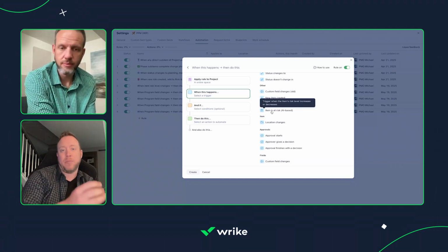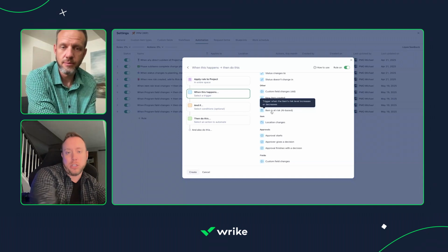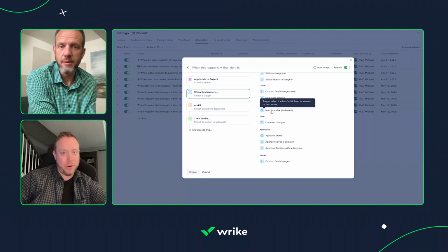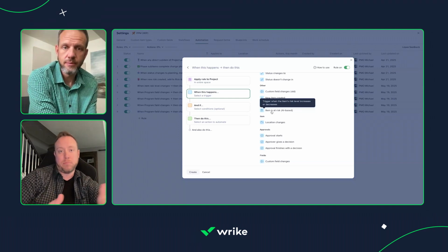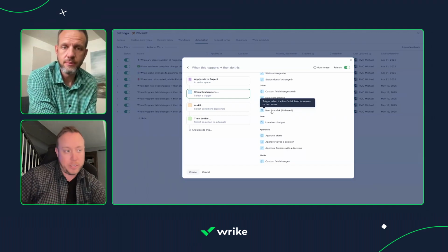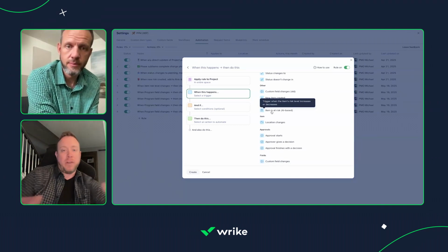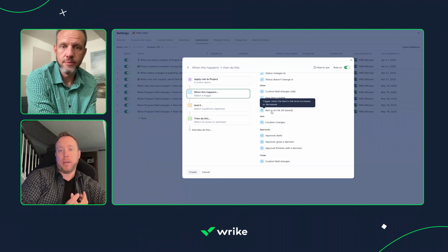We have the data. We can analyze what's at risk. Now we can use that data to launch automations as opposed to having to build our own at-risk automations. Wrike's gonna handle it for you. Once upon a time, I'd be like, well, when do you want to get an at risk? Two days as a due date's approaching, and it's still in a new status. You don't have to build that kind of stuff, right? Let Wrike tell you what is at risk and why.